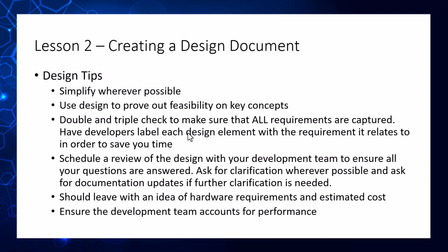Also use your design phase to prove out feasibility on key concepts that you have, and make sure you double and triple check that all requirements are captured and accounted for in your design. Have the developers label each design element with what requirements it relates to, which will save you time and help as you look at what did I ask for, what didn't I ask for, things like that.